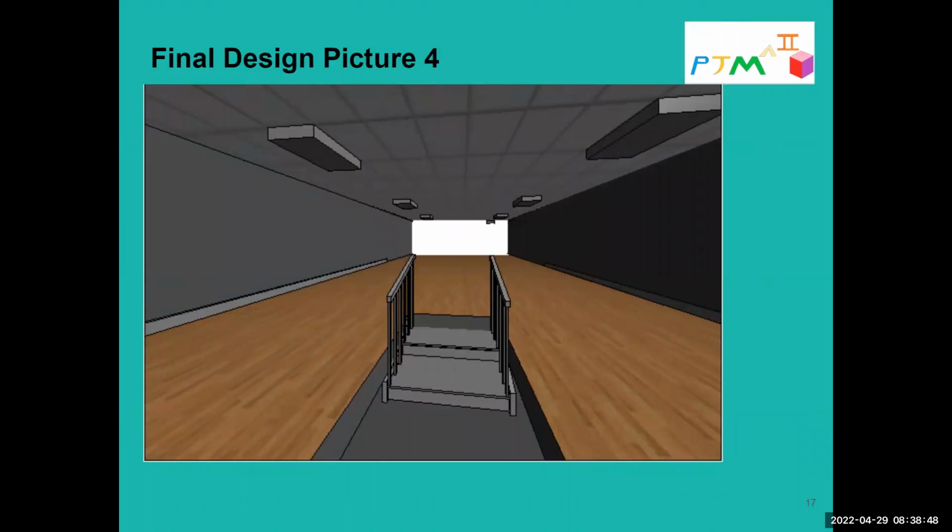And this is the interior of the antique shop. We didn't mention yet, but before we did this model, there are 2 radiators, one on either side of the stairs, and they're just in an awkward spot. That's the only heating source in the whole building of the antique shop. So what we're deciding to do is run heating pipes from the spot where they currently are to the side of the room, and run new baseboards along each side of the room. Next slide here.